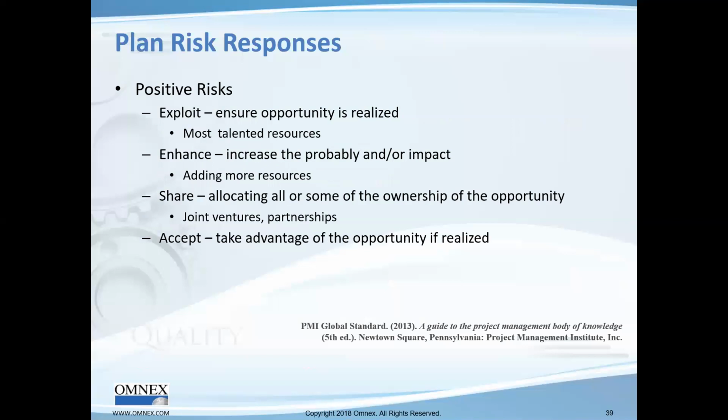Positive risks, these are things people don't normally think about. We tend to be very negatively oriented. And so what we need to do on positive risks, when we come across something that is a positive, we should see, can we exploit it? Can we assure that the opportunity is realized? Can we enhance it? Can we increase the probability? Can we share? Can we take this information and share it across the entire organization to other plants and that? Or we can just accept it. If it's something that we accept, really, we should be looking also at sharing. It's something that we can take advantage of in one plant, we should actually take it across the entire enterprise.